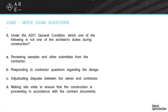There are four basic stages to adjudicating disputes. IDM is the most straightforward — right there on the site, you figure it out, maybe with written proposals from each side, and the architect writes a formal memo stating the decision and the reasoning. It's fairly simple and straightforward with no other players involved.